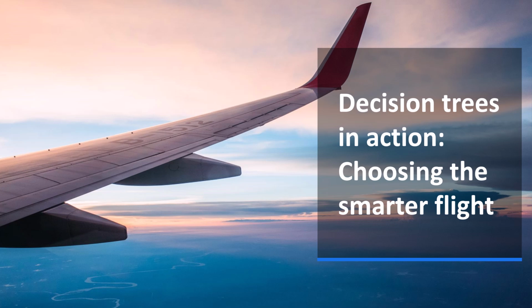Now, Flight B, this is probably the one that catches your eye initially, right? Lower price tag. Almost certainly. Flight B is much cheaper upfront, just €300 for the ticket. There's always a but. There is. The risk is higher. Flight B has a 30% chance of that same €4,000 delay. Significantly higher probability. So if we do the math again, 30% of €4,000, that's €1,200 for the expected delay cost with Flight B. Correct. 1,200 is the weighted risk. Now add that to the ticket price. So 300 for the ticket plus that 1,200 expected delay cost gives us 1,500 total EMV for Flight B.